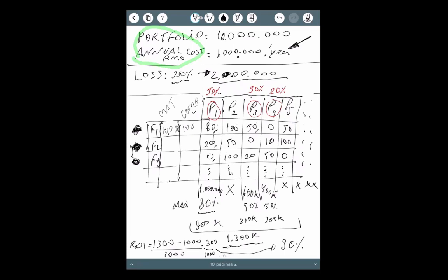But let's suppose that for function 2, maturity is 50% and competence is 100%. The result, 50% multiplied by 100%, will be 50%. And I will multiply this number by all these numbers here. So it will not be 20, it will be 10. It will not be 50, it will be 25. Not 10, but 5, not 100, but 50, right? That's the idea, okay? That's the idea.